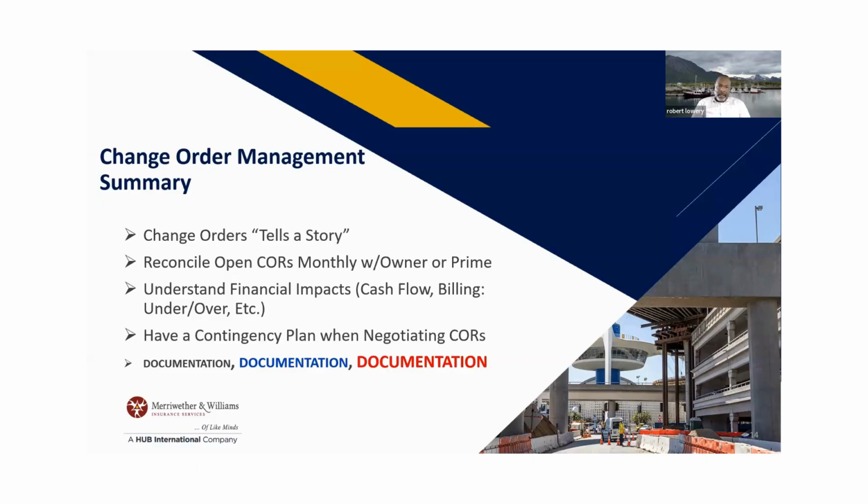The billing: you bill once a month, so make sure you get as many of those on there as you can. If the billing is net 45, we know it's going to take longer than 45 days to get paid. You want to say, can you do an early pay or something, which could be a percentage. If you're under billing, that's going to hurt your cash flow.